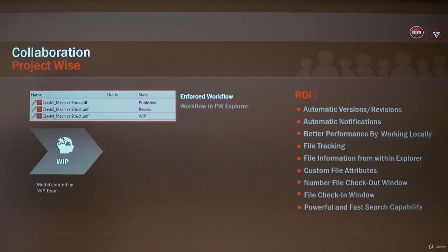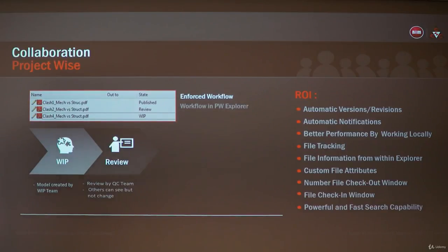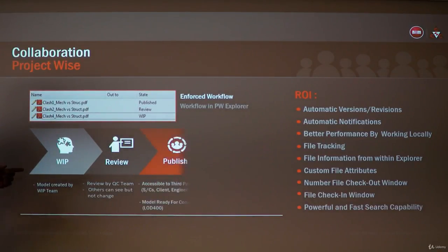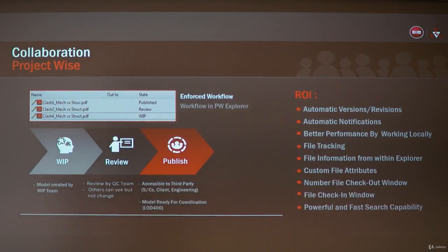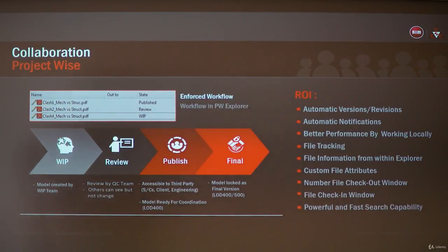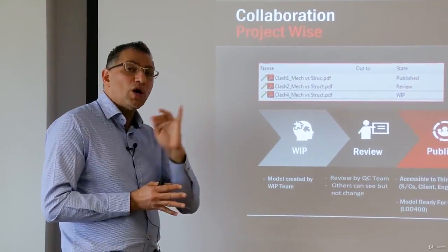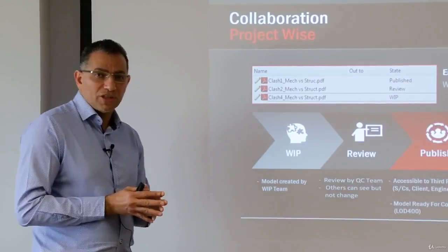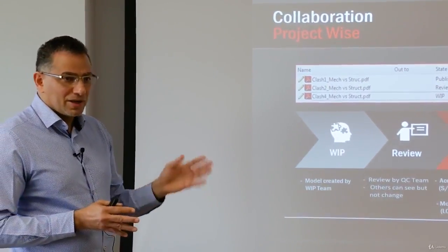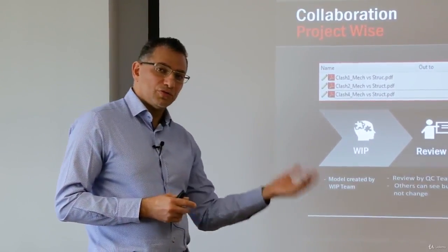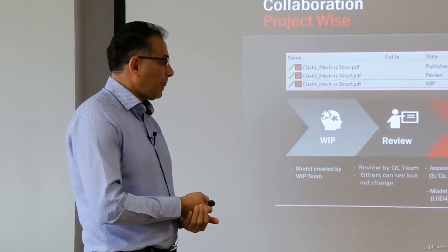So all the stakeholders were also following a certain workflow for producing models, reviewing models, and then publishing models to the different stakeholders, different subcontractors and different suppliers. And then the final model, once it is approved, will be exposed to all those who are supposed to view and use that model for any process like design coordination or material takeoff or clash detection or whatever.